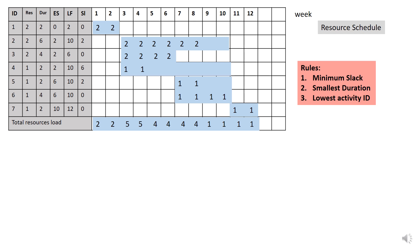So let's start with week 1. Week 1 and week 2 requires only 2 number of resources. So the total number of resources here is less than 3. So week 1 and week 2 is okay. Now you look at week 3.